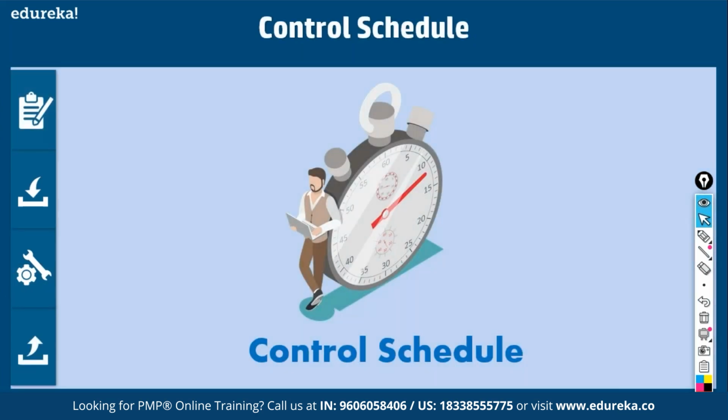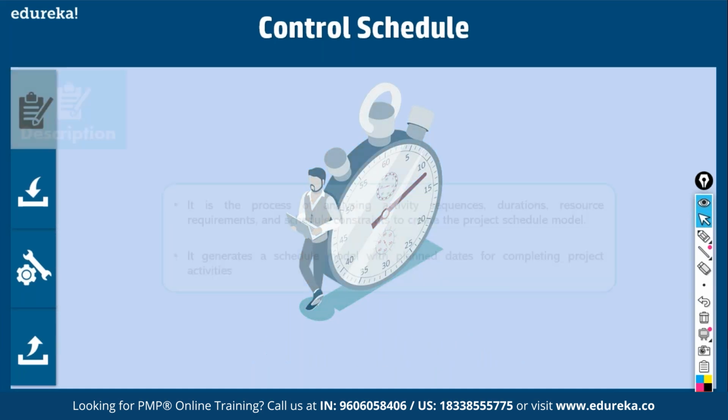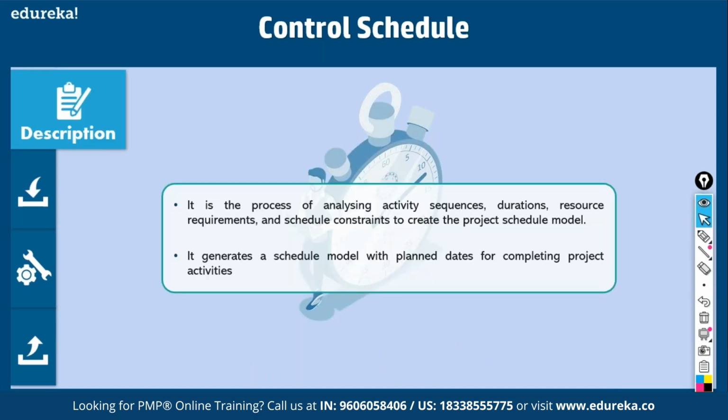Then finally, we have a process called control schedule. So here we make sure we complete the project on time. You analyze what the variances are, why these variances happen, why did the schedule slip? Is it because you did not get materials on time, or because of poor material quality, or there was over planning, under planning, overutilization, underutilization? So you look into why these variances happened.